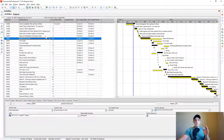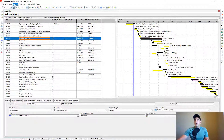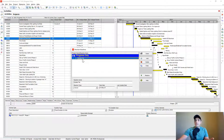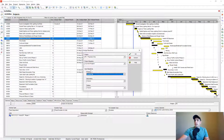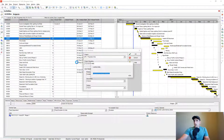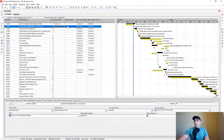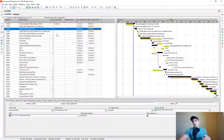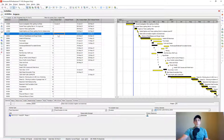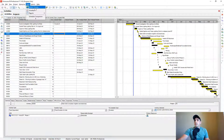The two schedules I'm looking at are my baseline schedule and the May 2021 schedule update. I have my baseline schedule open — I've called it my 'progress only' schedule — and I've baselined my update file, the May 2021 schedule update, assigned to my primary baseline slot. Right now my actual start dates are mostly blank. I'm filtered for the longest path, and I want to apply all the actual start and finish dates from my update to my baseline, move the data date forward, and see where the schedule projects.